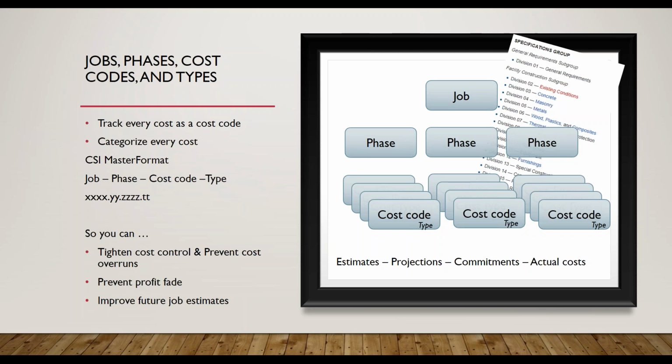You'll often see 3, 4, or 5 digits here, and it's assigned to specific labor and materials. And then there's the type, like labor, materials, overhead, equipment, and a small set of other items. Often in systems, you'll see these combined into one string or one code, such as phase, that pulls together the phase code and the cost code into one.